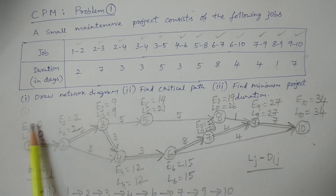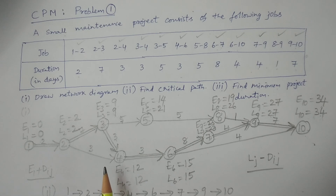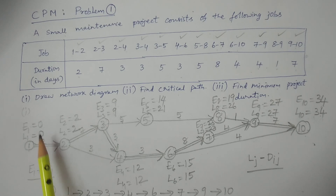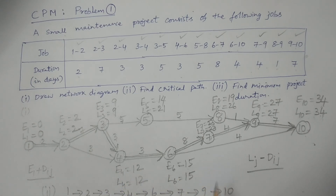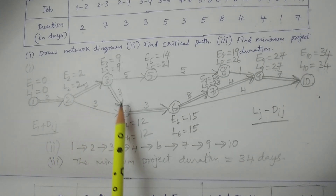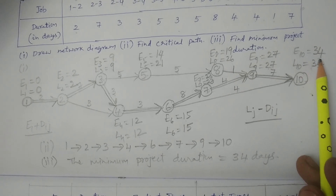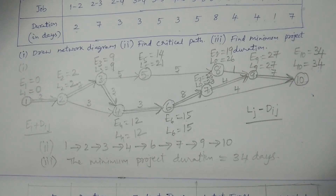After that, how to calculate E's and L's — that is earliest times and latest times. Both times are calculated using forward pass calculations and backward pass calculations. With the help of that, for which activity or event E is equal to L, we join those activities to obtain the critical path, indicated by a double line. The minimum duration is obtained at the end node.